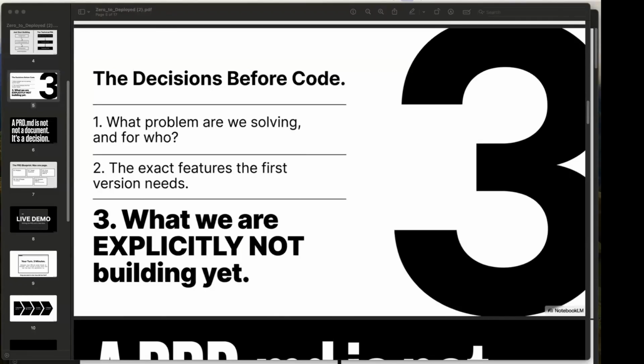So yeah, another thing the PRD allows us is to create an implementation plan so that you don't just say you want to attack all of your features all at once. Because the thing about applications is when you're thinking about it, you might not see those complex flows. But when you are in the middle of it, you now begin to see, oh, for this to work, I actually need this. For this to work, I actually need this. And then by then, you are in too deep and things start getting complicated.